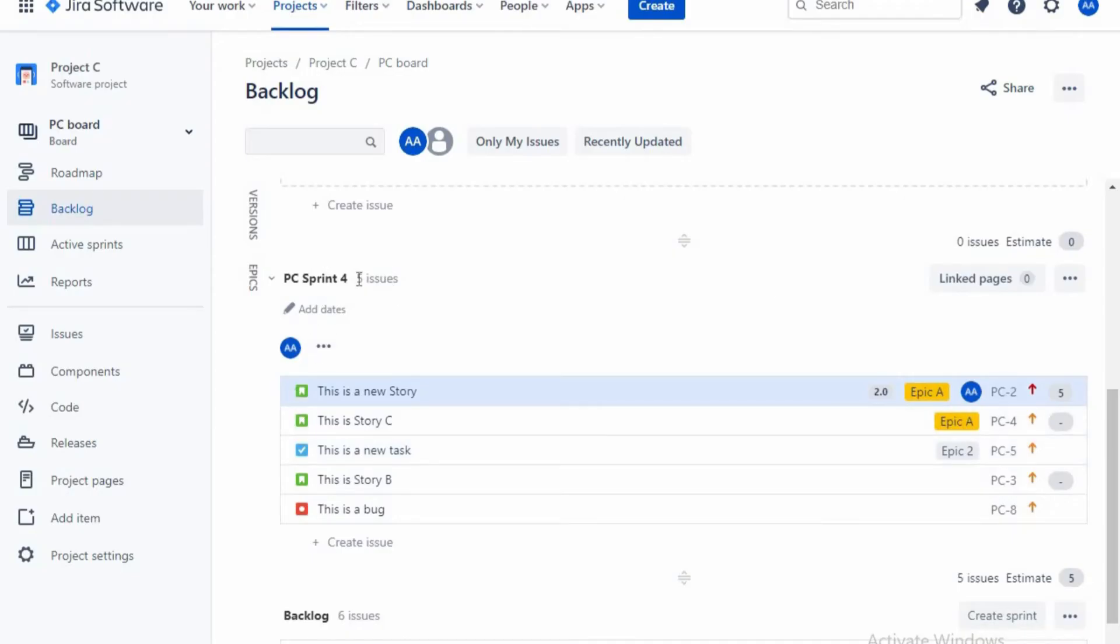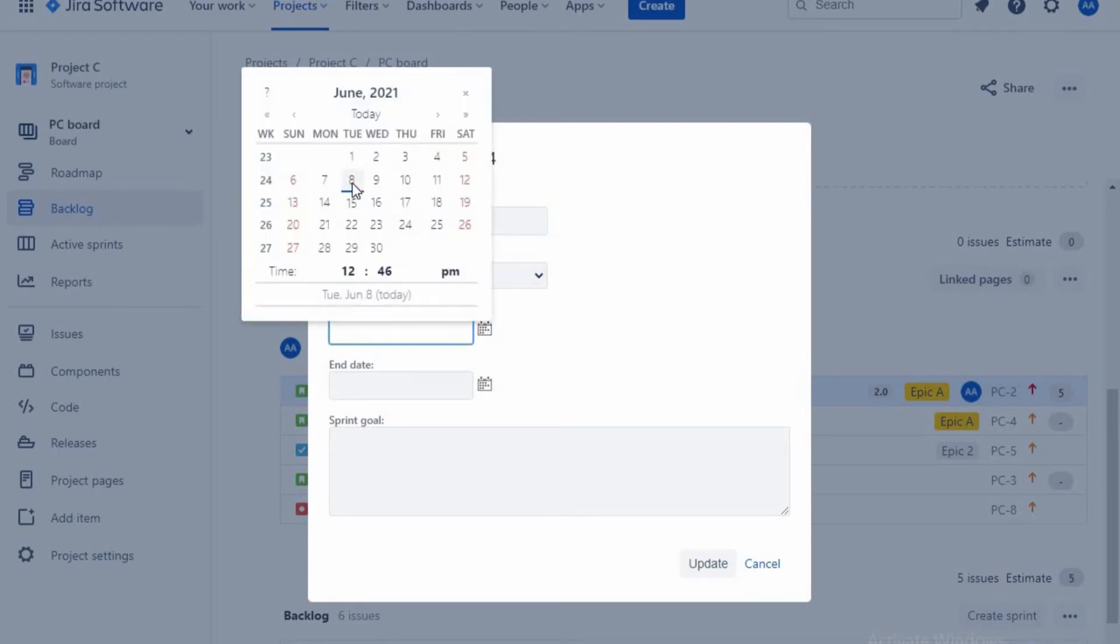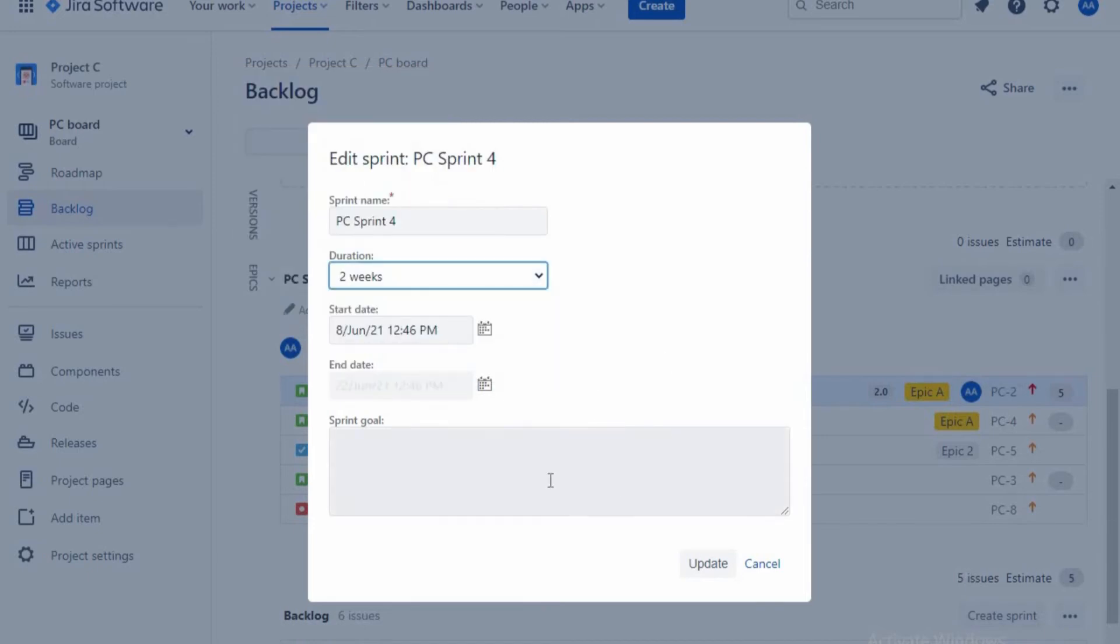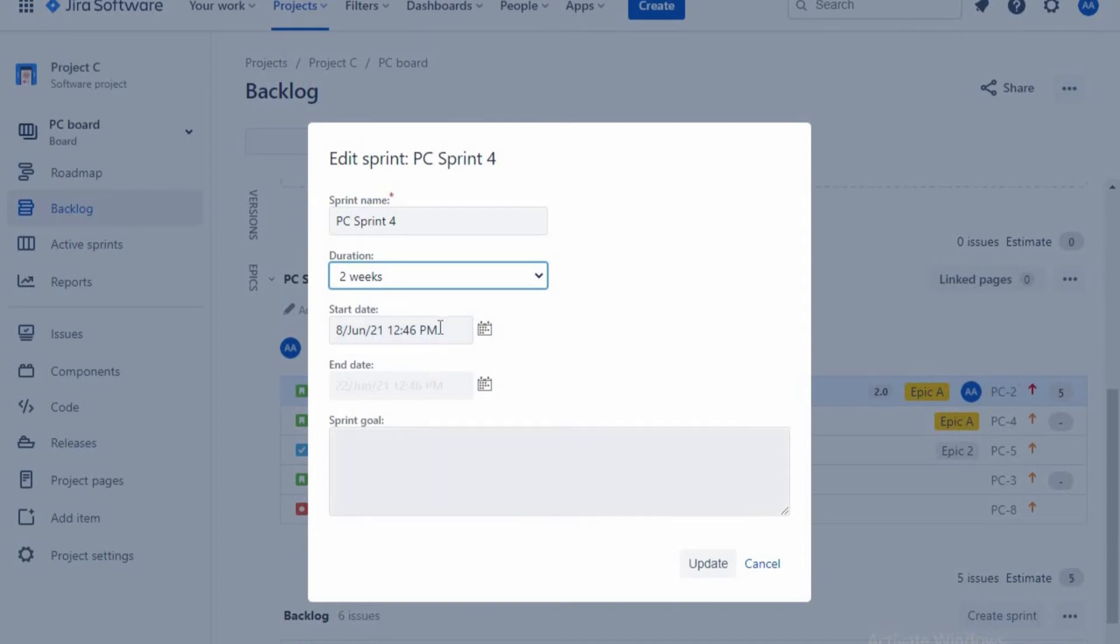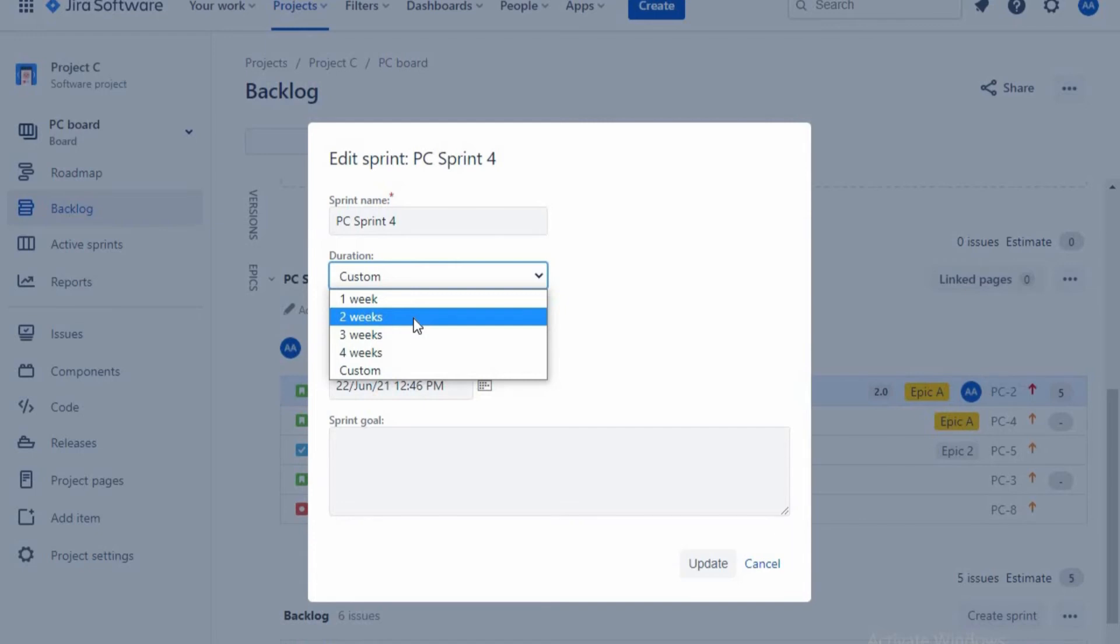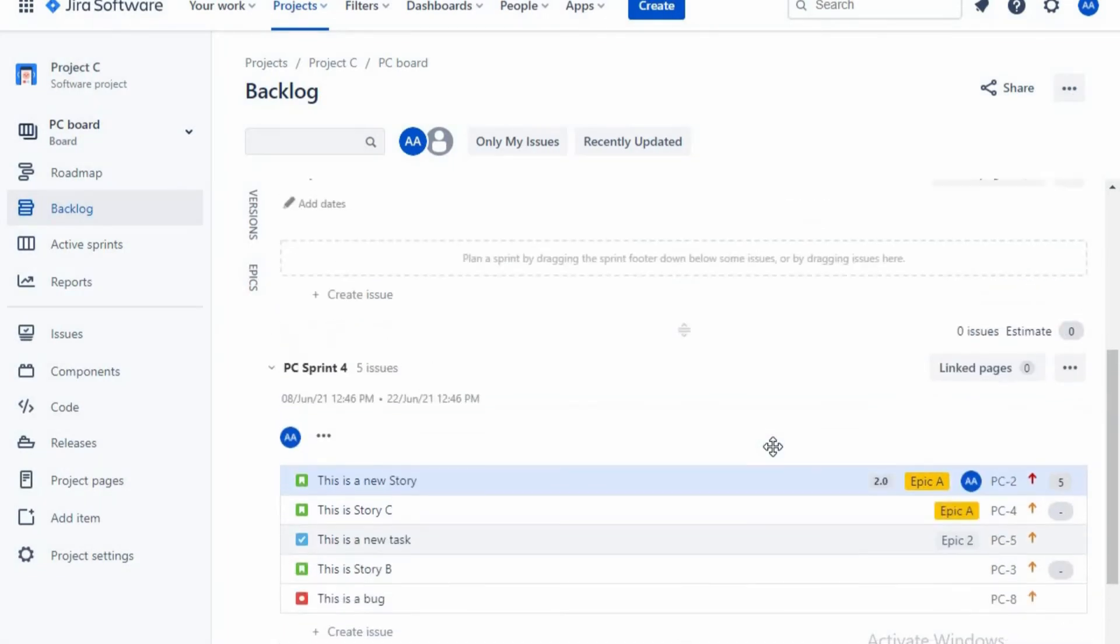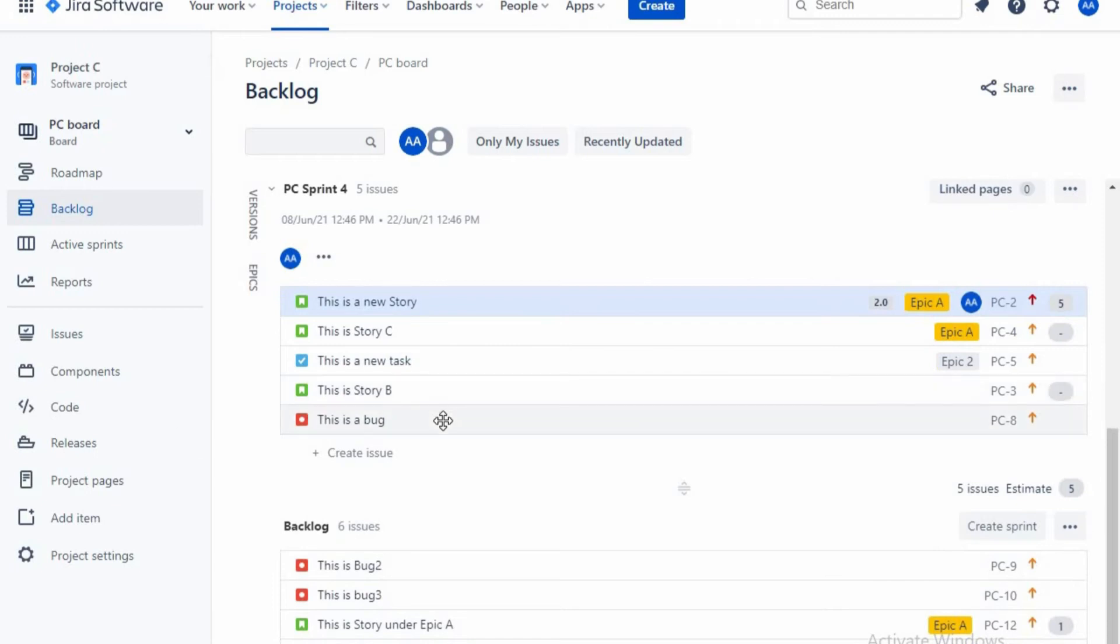And if you want to change, you can change the name of the sprint. There's a sprint name and you could change the sprint. So now let's say I'm starting it by today and I'm changing it to two weeks. If you make it as one week, automatically end date will be taken. If you make it as two weeks, automatically end date will be taken. You can even make it custom, but mostly the companies will have one to four weeks of schedule, but mostly a lot of companies follow two week sprint. I'm just updating it. So now the sprint is updated.